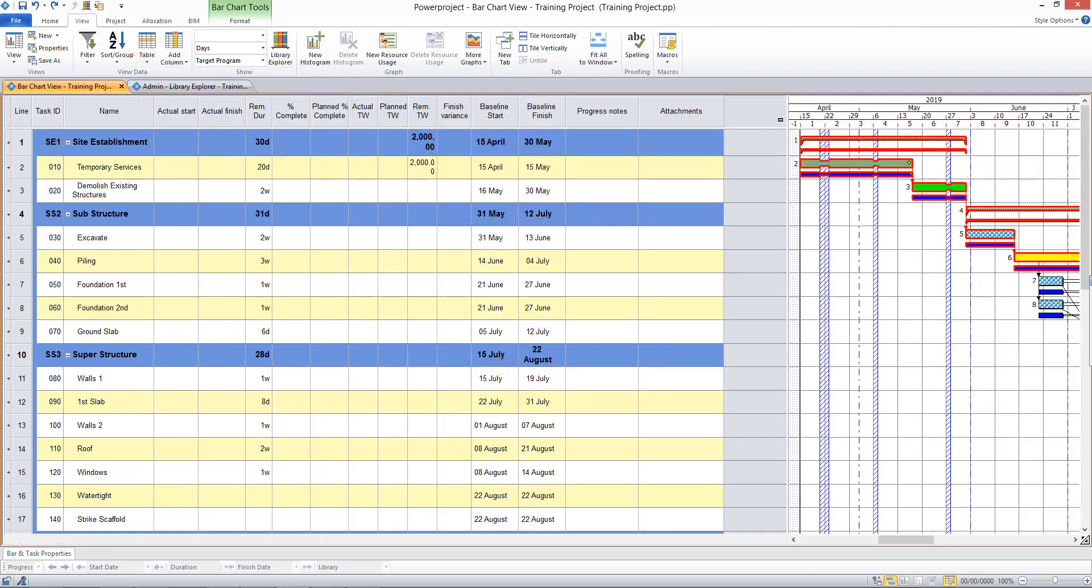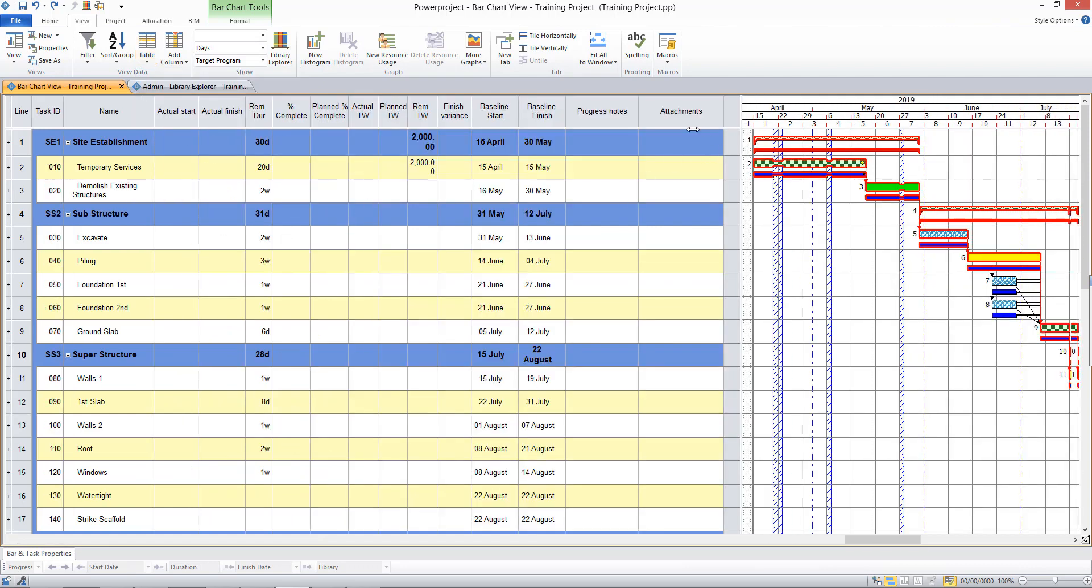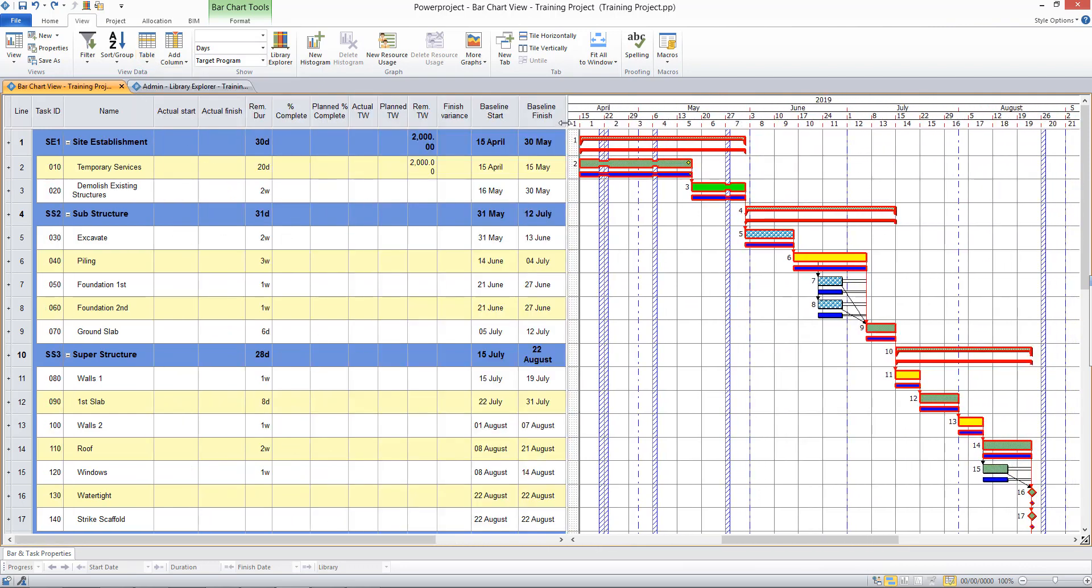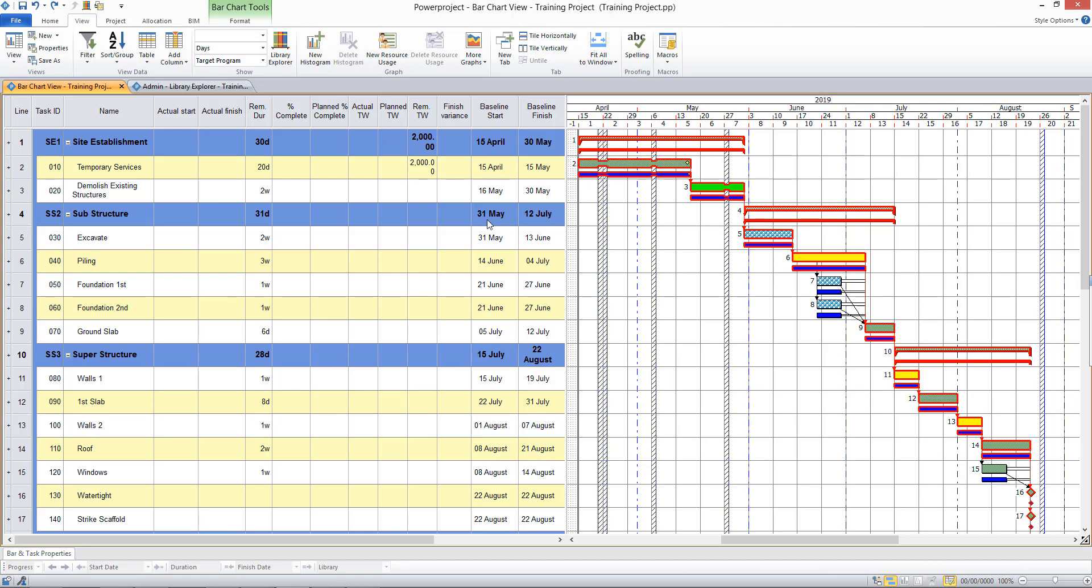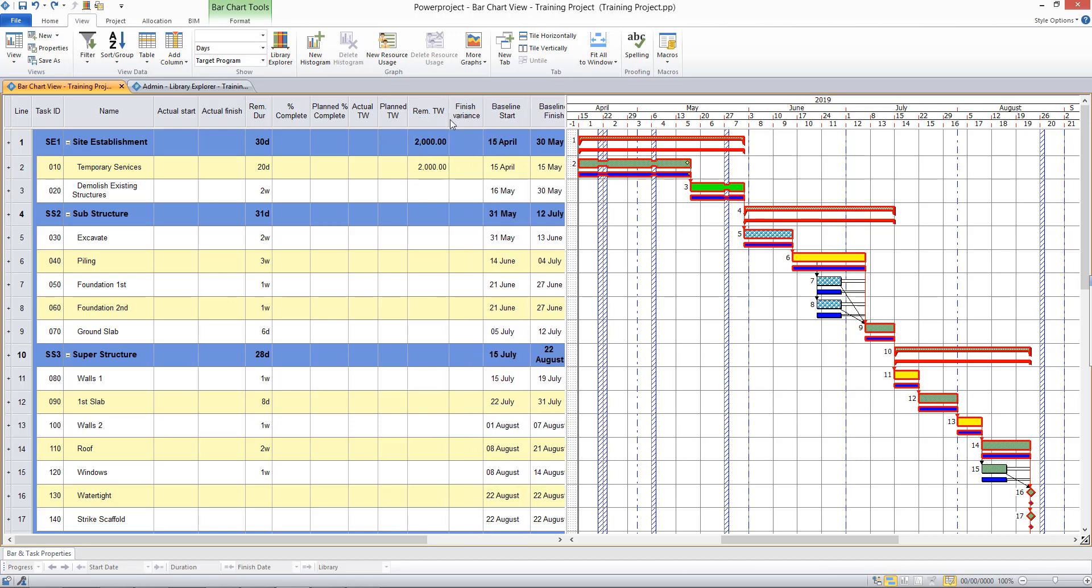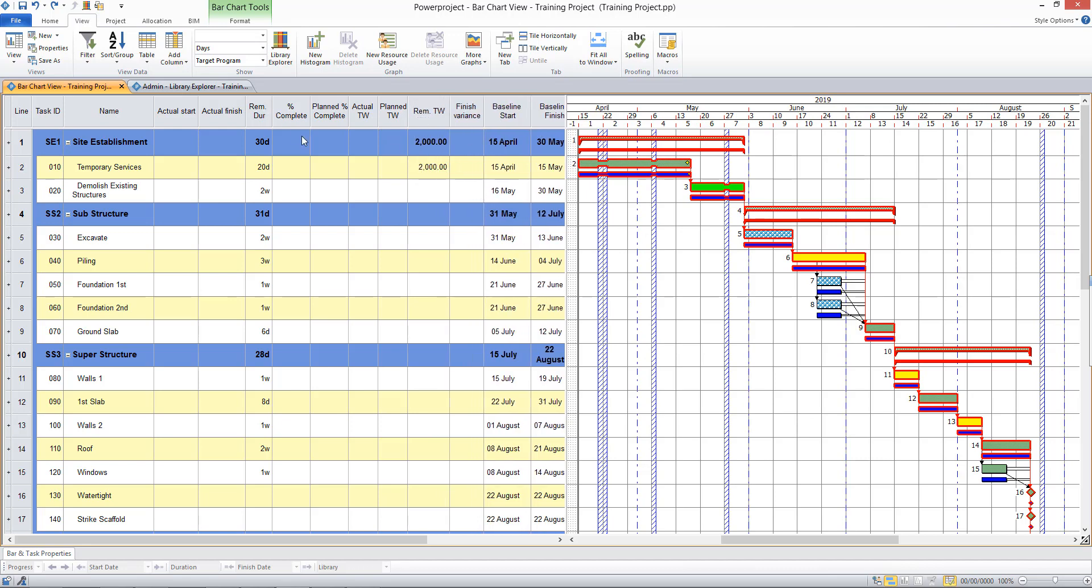So this is quite a detailed table, but it's shown me my planned start and finish dates there. I'm able to put in my percent complete information and also task work information. So this is showing me that I've got 2,000 units of task work to complete on that first activity.